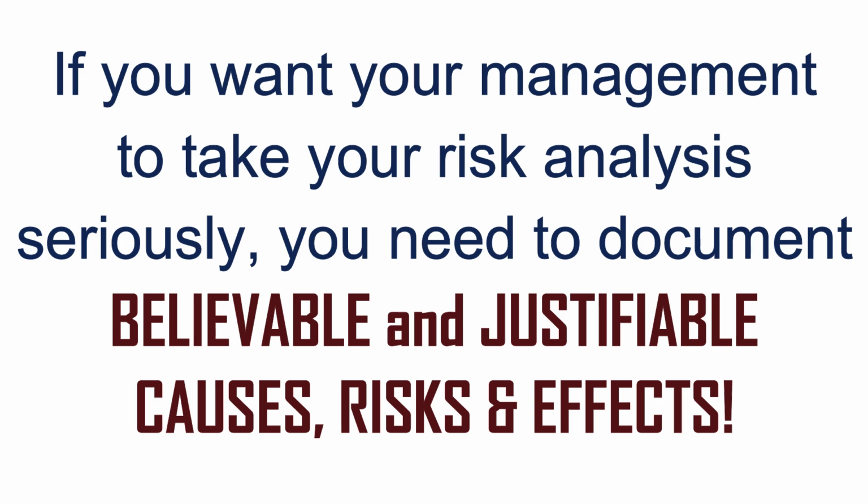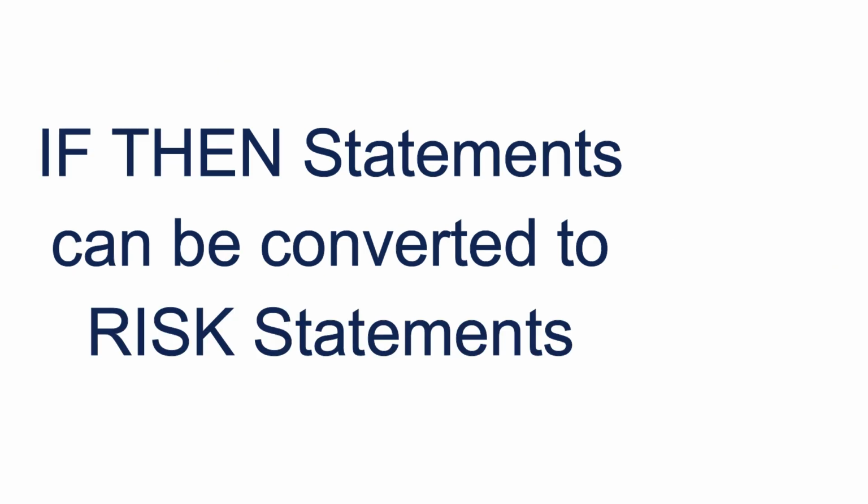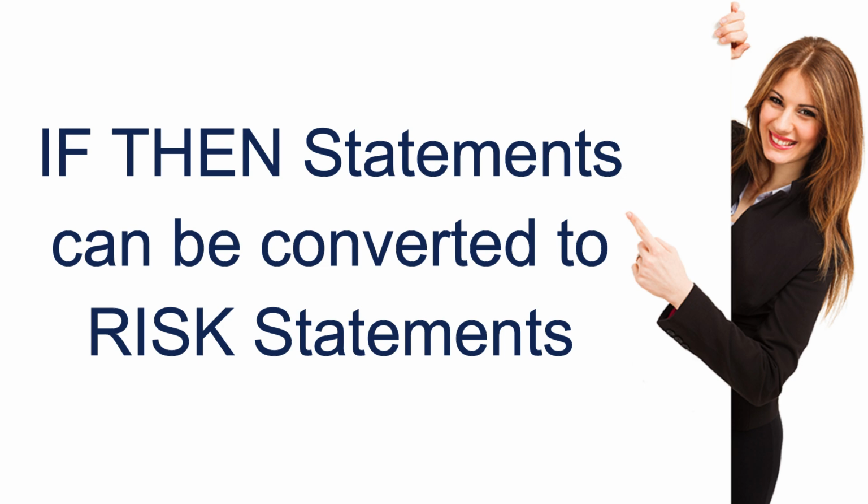The only way your boss or anyone else is going to take your risk statement seriously is when the cause is believable, or the conditions or the basis for your concern are real. Then you say, okay, now I have this one concern which, if it happens, could have these kinds of outcomes. Many people are used to using if-then statements. If the euro goes up in price, then our purchase is going to cost us higher, right?